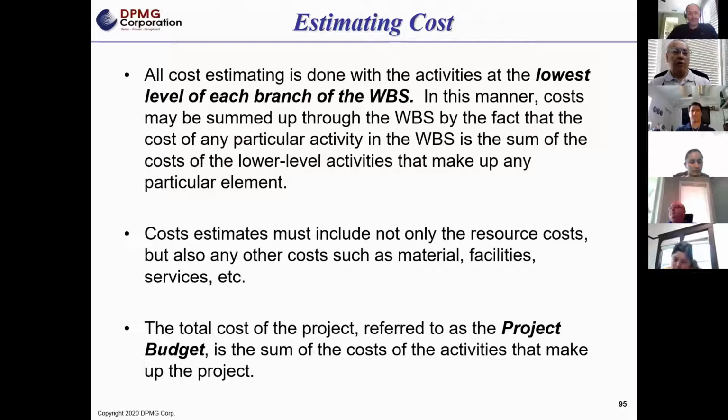One of the things we always recommend is for the accounting function to give the project managers a "company labor rate" to use, or very specific labor hour costs for the different functions in the organization.